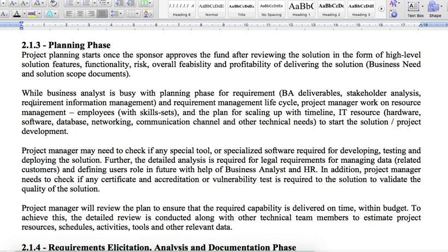Okay, we will meet as a working committee once in 15 days, a steering committee once a month or once in 2 months, then there could be management or senior management committees once a quarter. All these different committees have different roles, and depending on the committee, the project updates and progress are discussed.